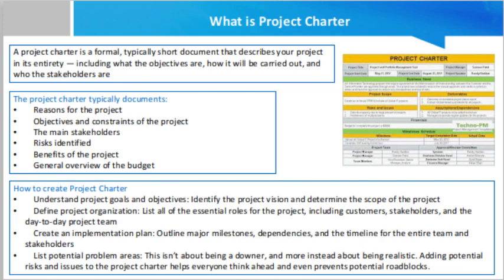Organize. When you are building a structure for your charter, there are 4 subsets you are going to need to identify. This is done by listing customers or end users. To complete this list, ask yourself what is a customer and end user in the context of this project. Who are the project customers? Is there a specific individual or entity responsible for accepting the deliverables of the project?